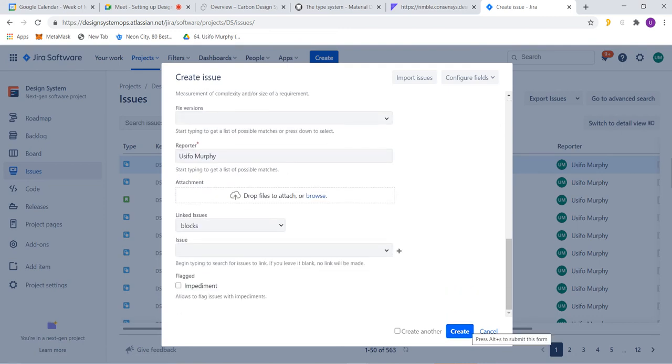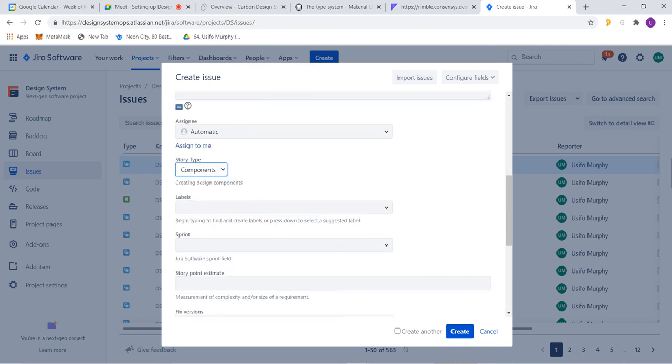So if I click on create, what is going to happen is, first, the process executor is going to run, right? And when it's running, it's going to deploy our process templates. It creates all the processes for us, all the stories for us: create the propose, create the design, create the doc, publish. It creates those templates for us. And when these templates are being created, each of them has its own label. For the proposed, it has a label proposed. So once the other executor sees that this story has the label proposed, it starts running and starts creating subtasks. Still looks like English, but let's press create.